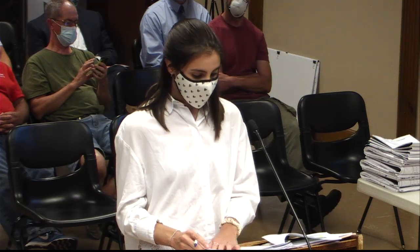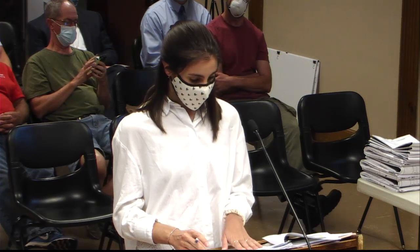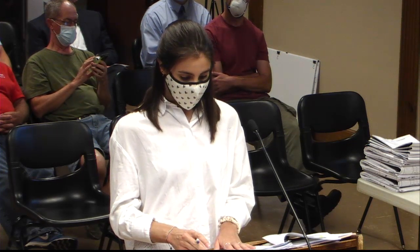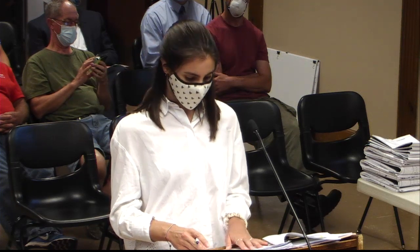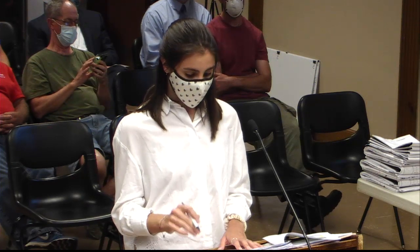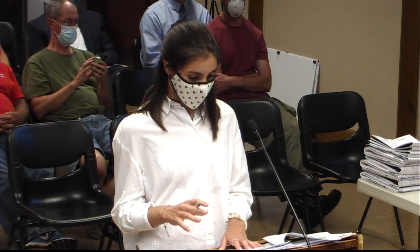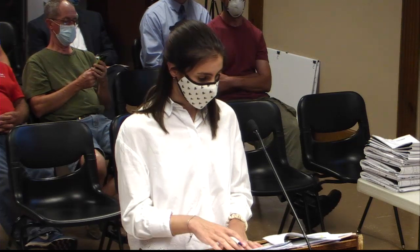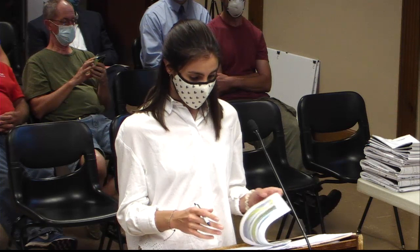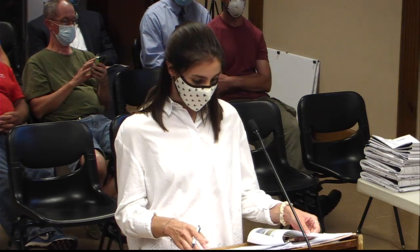We also provided spec sheets for the inverters and racking, and provided some more details about the access road on site. It will be gravel or item 4, which is a similar material. We did not provide a spec sheet for that. That is still being designed. I did want to confirm, I believe this was raised last time, that there will be minimal or no grading on site. There's really no significant slopes on site, so we won't have to do anything there. As you can see in the photos that we submitted of the example system, with the fixed tilt racking that we're using, we can actually follow slight grades, so we don't need to be grading any land.